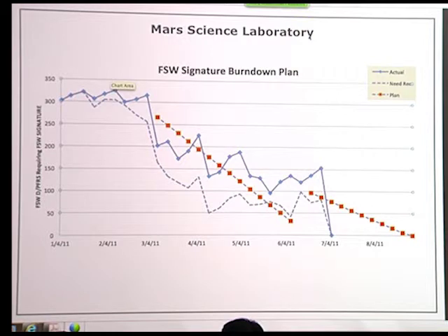We did employ, actually let me start with the PFR system. It is an institutional tracking tool, as Amalaye said, for all sorts of problems, and it is a much more formal system that needs direct approval. And it's both for hardware and software and all sorts of other test issues and such that happen after products are delivered and are going through system integration and test.